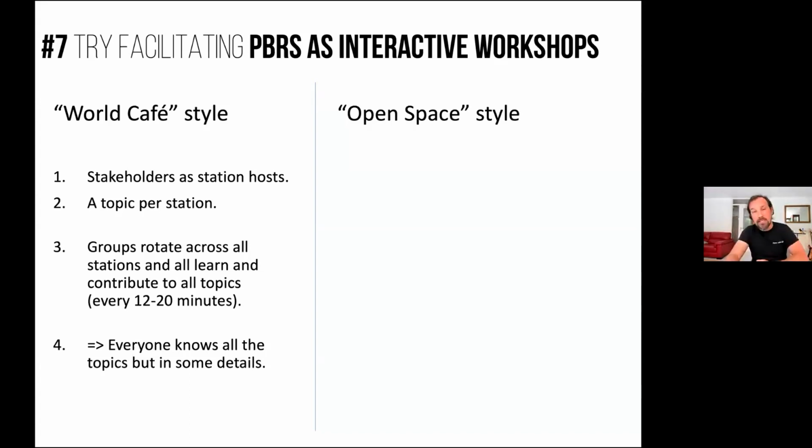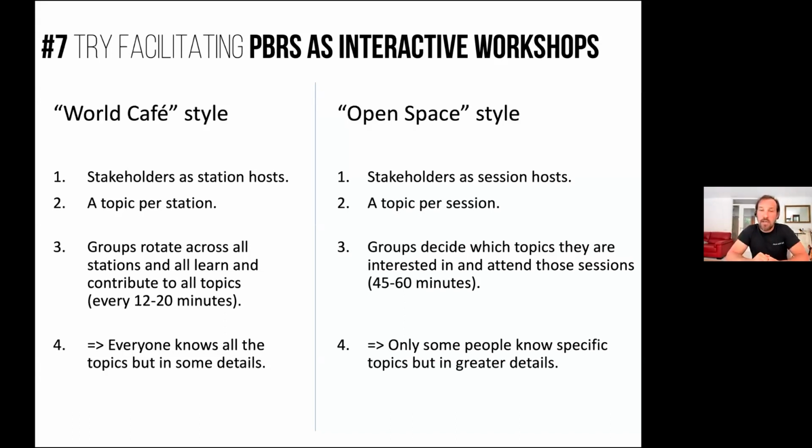The open space technique is a bit different. You also have these different sessions, right? Not stations, but sessions. They can be different rooms, or different corners of your larger room, or different parts of your Miro board. And then there's a topic per session. And sessions are a bit longer, I don't know, like 40, 60 minutes. Probably it's something for the group to go deeper in this topic.